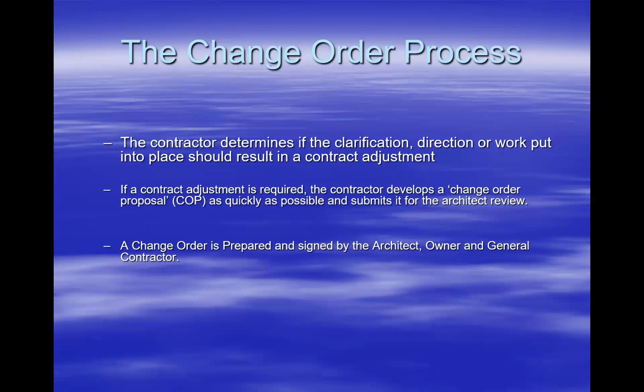So in other words, our change order proposal was actually the change order. And I'll be honest also, it was not the architect trying to get out of work, but we had the information, and it was easier for us to prepare the document for them. Then if they agreed to everything, they would sign, the owner would sign, then we would sign, and it would all be executed at that point.